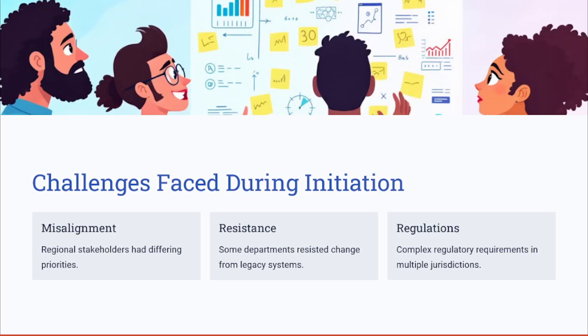What were some of the challenges faced during the initiation in this example? The initiation phase encountered challenges such as misalignment between the regional teams on the project priorities, resistance to change from employees who assumed that they would be replaced, use of or access to legacy systems, and navigating complex regulations across different countries. These issues underscored the importance of thorough stakeholder analysis and expert judgment during the initiation.